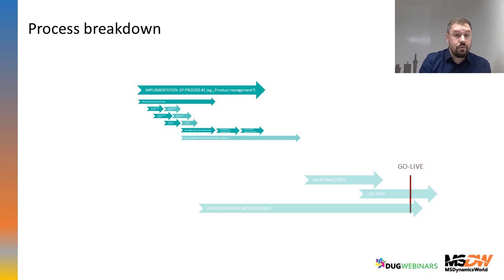They start to develop and realize these priority one tasks. When they finish, consultants are testing, and everything I do within the parameterization, which should be done in the future operational environment, I should do there too.